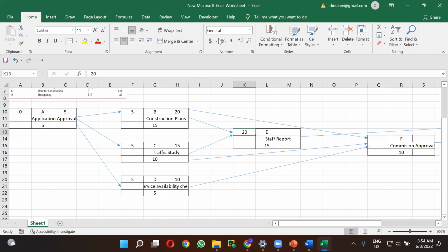So although we are telling it as early, although the wording is telling as early start, you have to take the highest value. Is that clear? Right, I think it is clear.